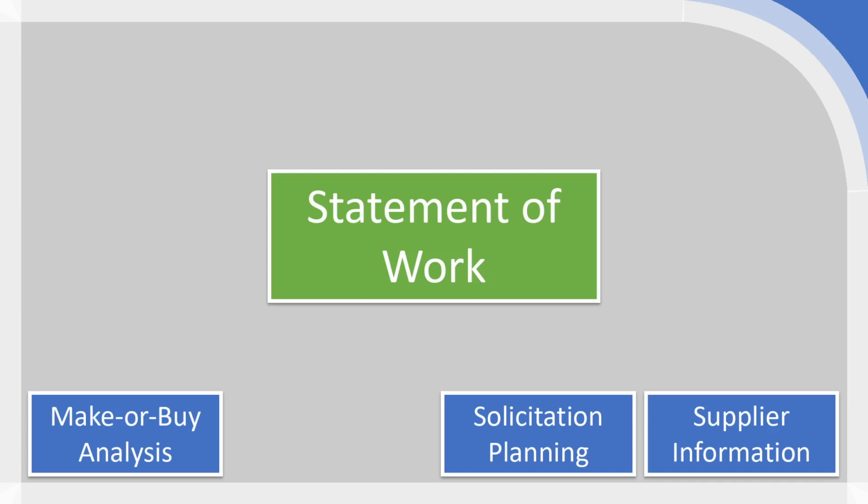Like with many things in project management, it's a good idea to consider the statement of work to be a live document. So it cannot be unilaterally changed once you actually start executing your procurement activity itself and you go out to particular suppliers, but it should remain updated through mutual consent at the latter stages of the procurement cycle. It will transfer over into a contractual form once you've actually completed your supplier selection process. But prior to that, it should be a live document which remains a snapshot of exactly what the procurer or the client needs from the procurement activity.